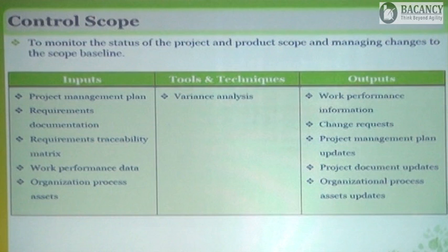We require some additional funding because we have realized that our people do not have adequate knowledge about this. So it is going to impact the cost, it is going to impact your budget, and we are assuming the entire plan is finalized now, so it will have to go through the change process. So we are influencing the factor which will help us avoid missing these functionalities in the future.